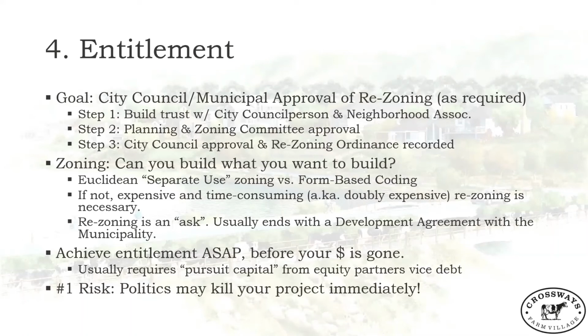And so if Crossways was built there in Bryan, Texas, you'd be converting land that's probably zoned for agriculture, because it's the Putter Gills Dairy Farm, into a higher intensity mixed use designation. So you're moving it from agriculture to mixed use. That's a huge step up in terms of intensity of development, and that's already going to raise some concerns with the locals. And just note that if you find land that's already zoned for your use, if you had bought a mixed use parcel, you get to skip this step entirely and build by right.